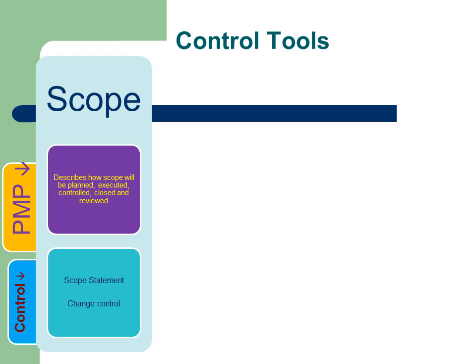We will now review key control mechanisms for each knowledge area. Scope control. The PMP describes the change control process which is required to ensure that any changes within the project are documented, analysed, approved, and incorporated into the necessary project control documents, such as the schedule and cost management system.